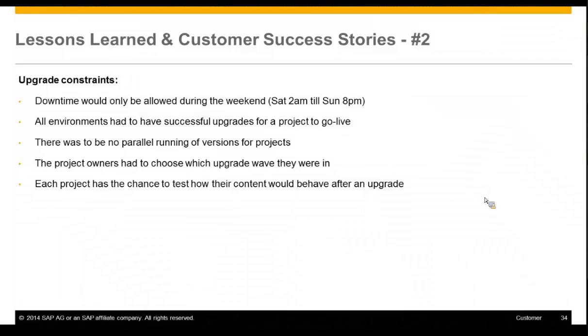they were not interested in talking about downtime at all. Pretty much they wanted to bring down the system just over the weekend. As you can see there, it's a mission critical deployment, and they wanted to reduce the downtime to a weekend to do the upgrade. And again, there are no parallel running versions for the projects because they were talking about the cost that they have to spend to maintain the parallel versions.